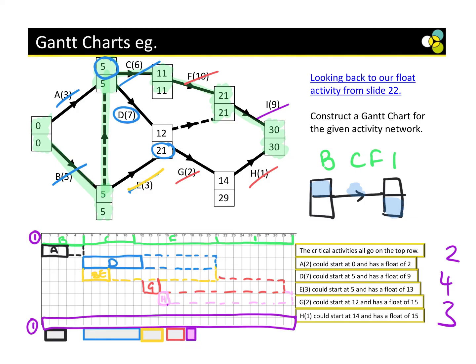So technically, what is the minimum amount of people I need to help me make this cake? 2. Absolutely. What we've done here is created a scheduling diagram. Some of you said 4 people. Well, when you do a business degree, you're going to lose a lot of money, because if we're doing business, you're going to hire people. You could even add some extra jobs here. You can see this one is continuously working, this one has a little bit of time. But the minimum amount of workers we need to complete this cake is 2.